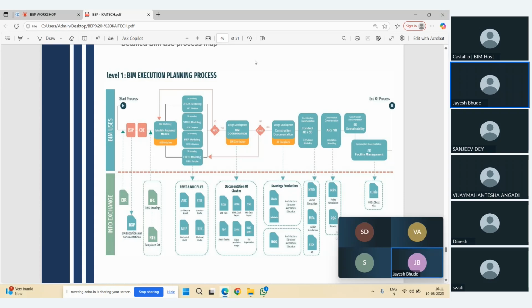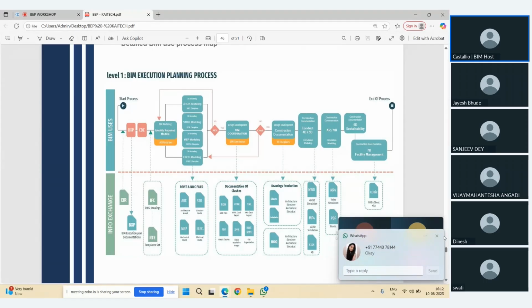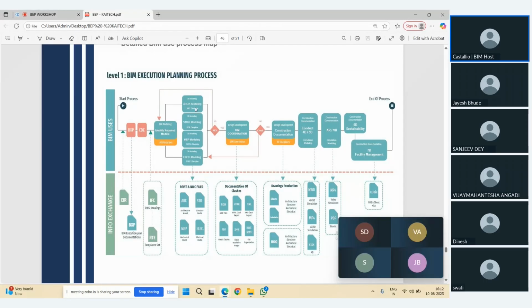But after the modeling stage, there is that revision, right? REV. After modeling, like architecture, structure, MEP modeling, there is revision. This revision is for the QA/QC. So we discuss the quality check. Let's say if people modeled everything and the modeling is not as per the quality standard, quality assurance, it will be revised here, and the information will be sent back to that modeling team, saying you need to correct this again.